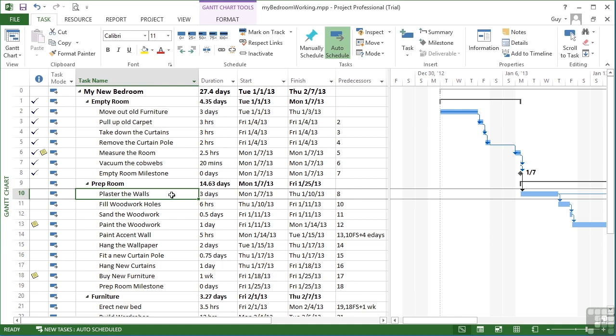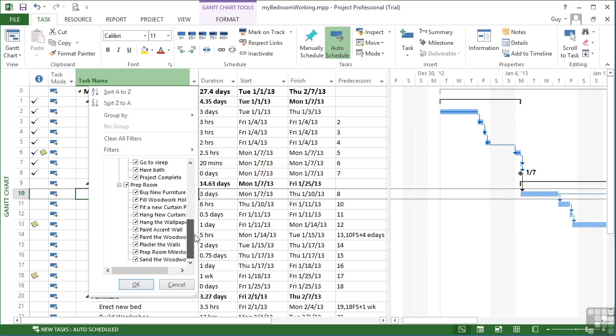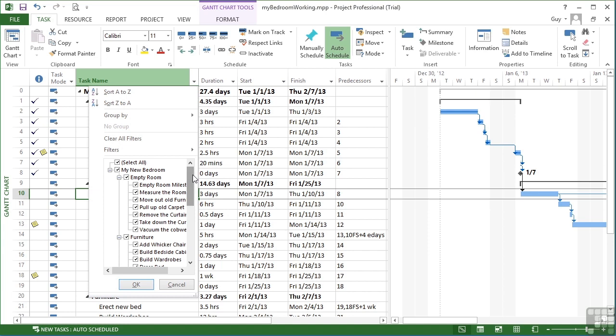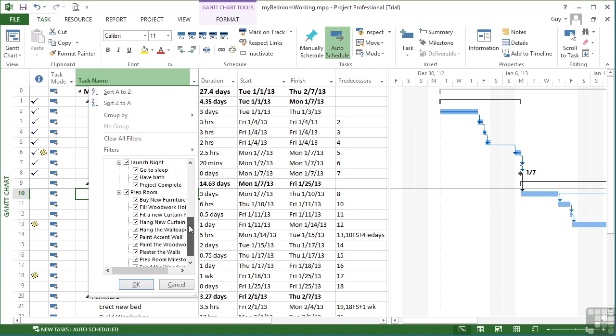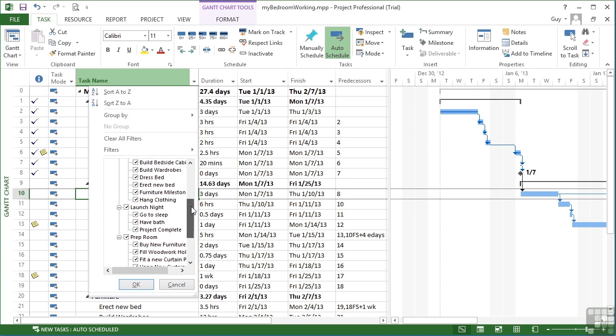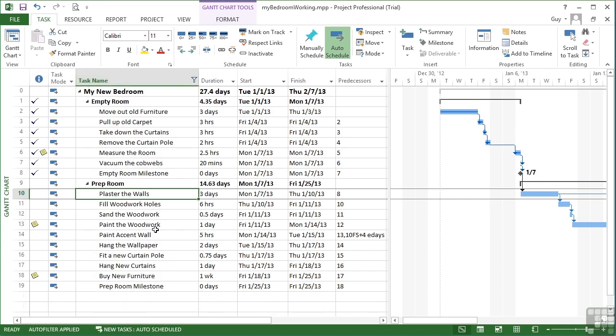All of the columns within your task table have little drop down arrows that we've already seen in action when we've been sorting. We can use them for filtering, so it's the same little drop down arrow. Instead of sorting by A to Z or Z to A, we can come down to the filter section. In the filtering you can see we have every unique value in our list, so in this case because we're on the task name column we have all the tasks. I can say let's not include the furniture or the launch night, and OK, and then filtering.